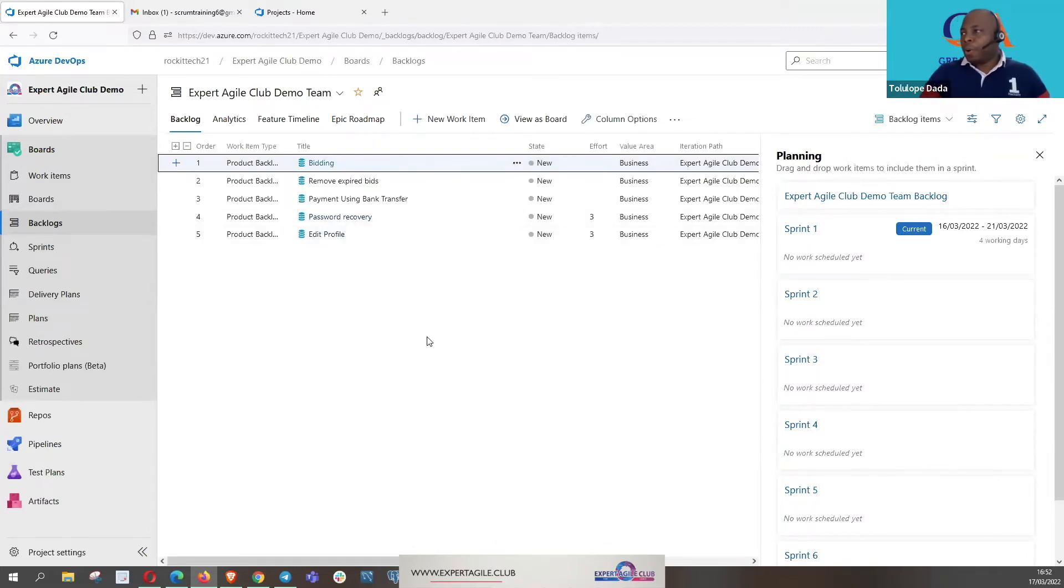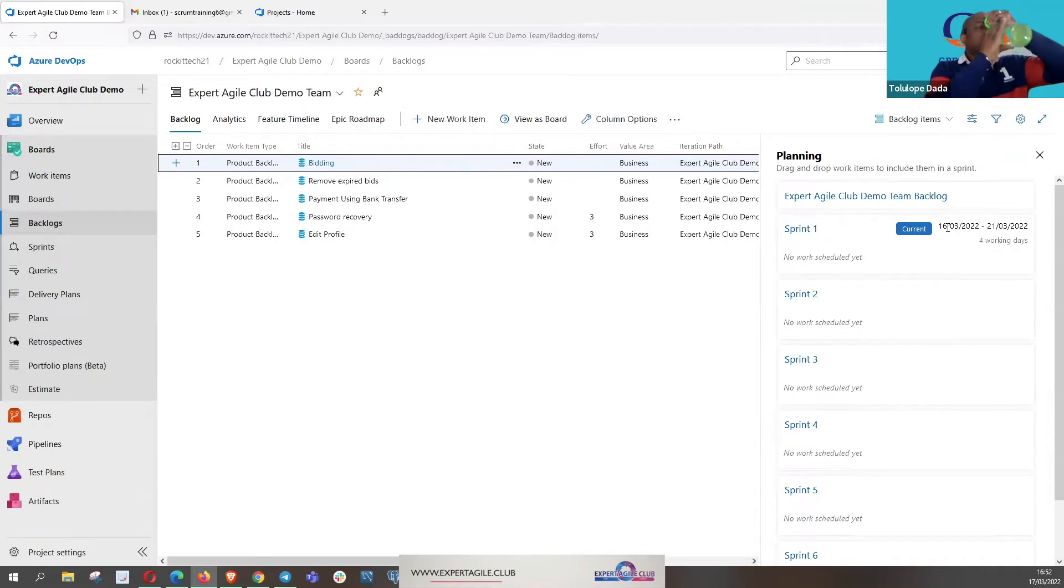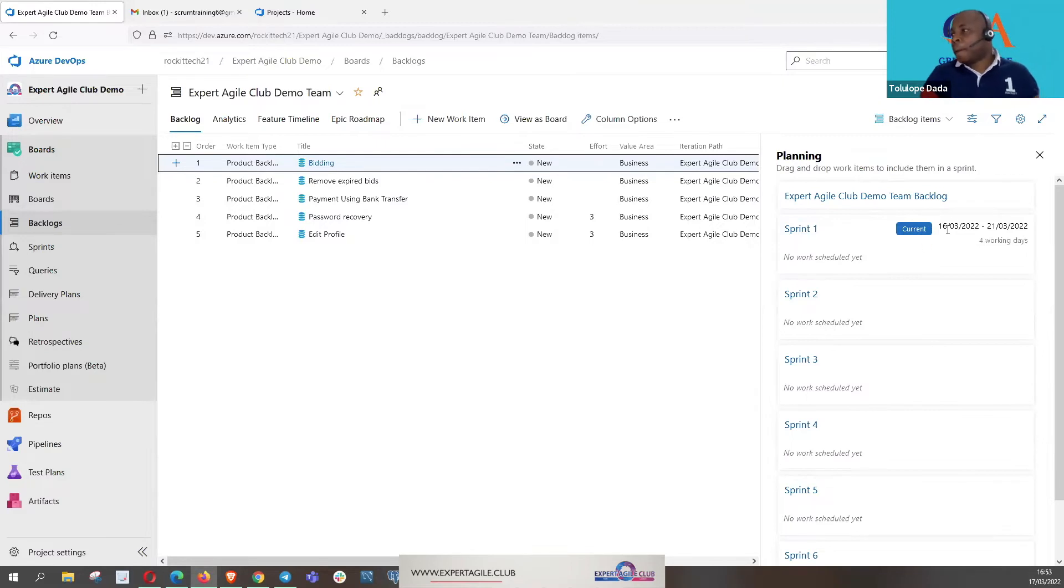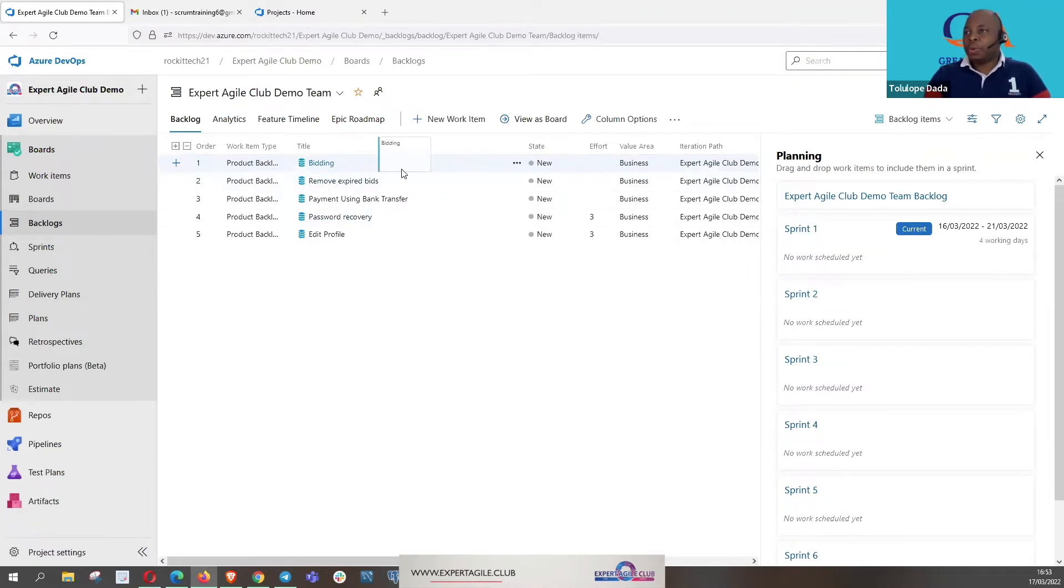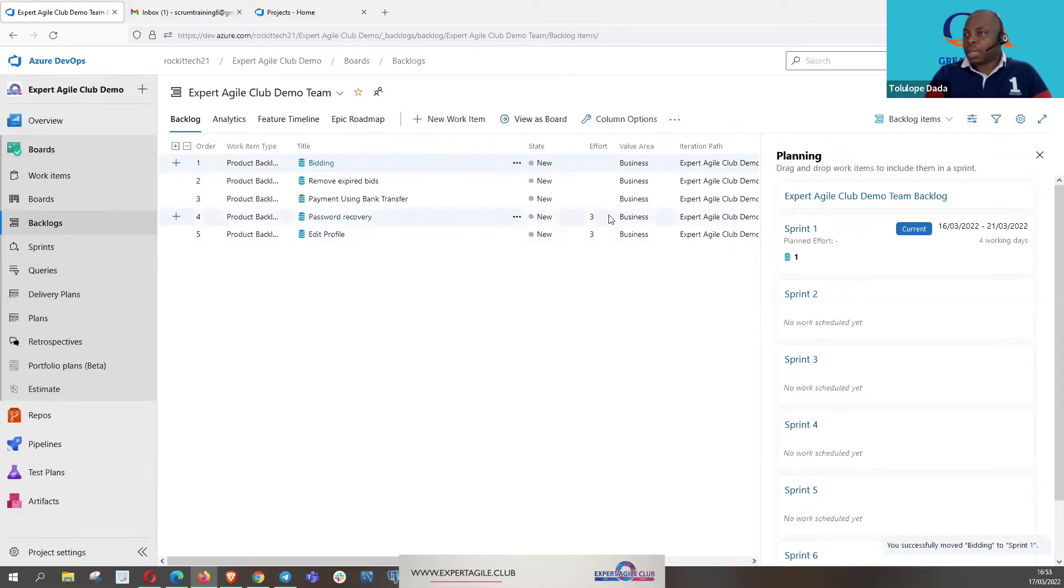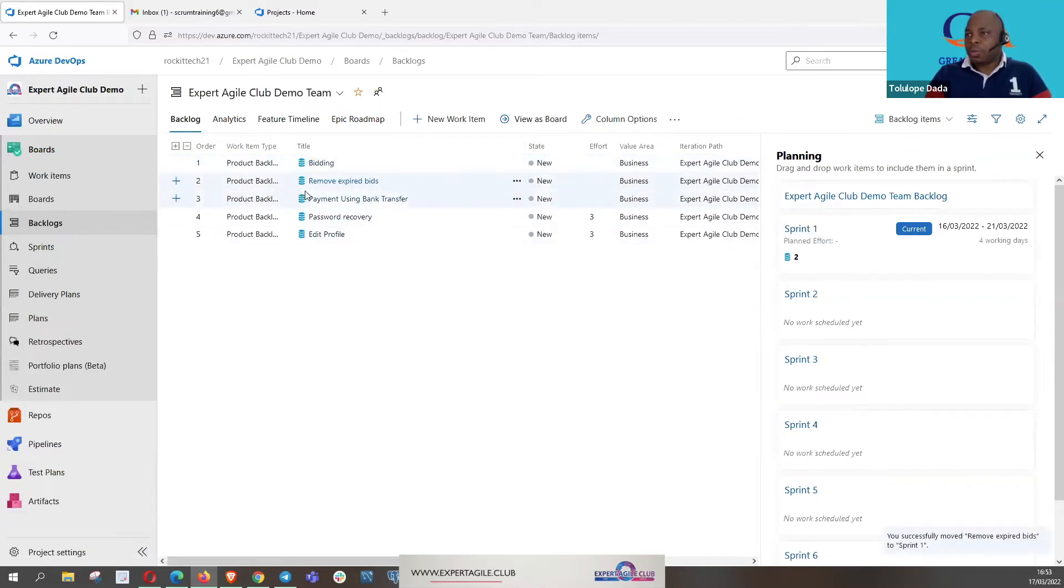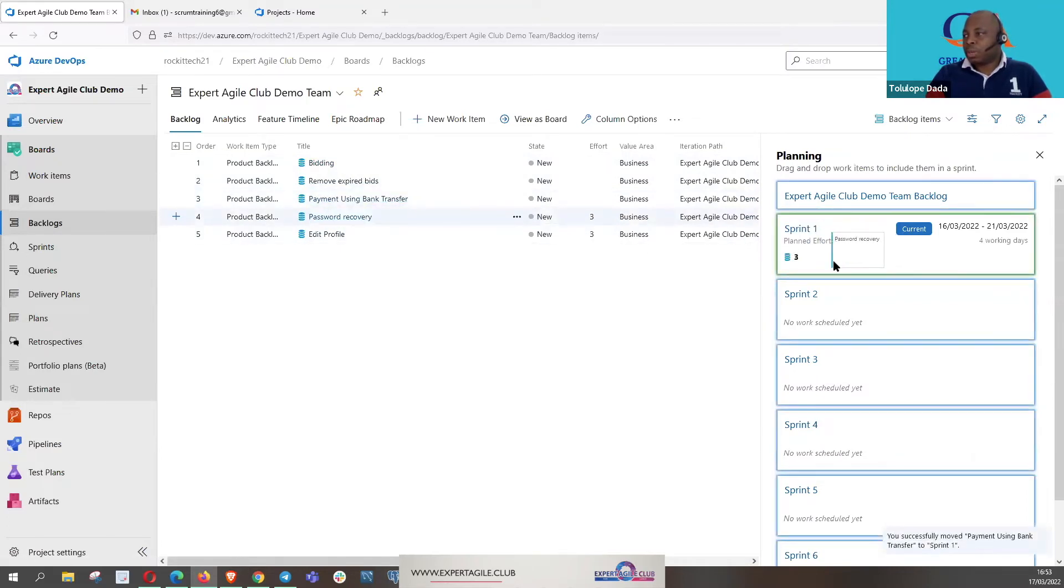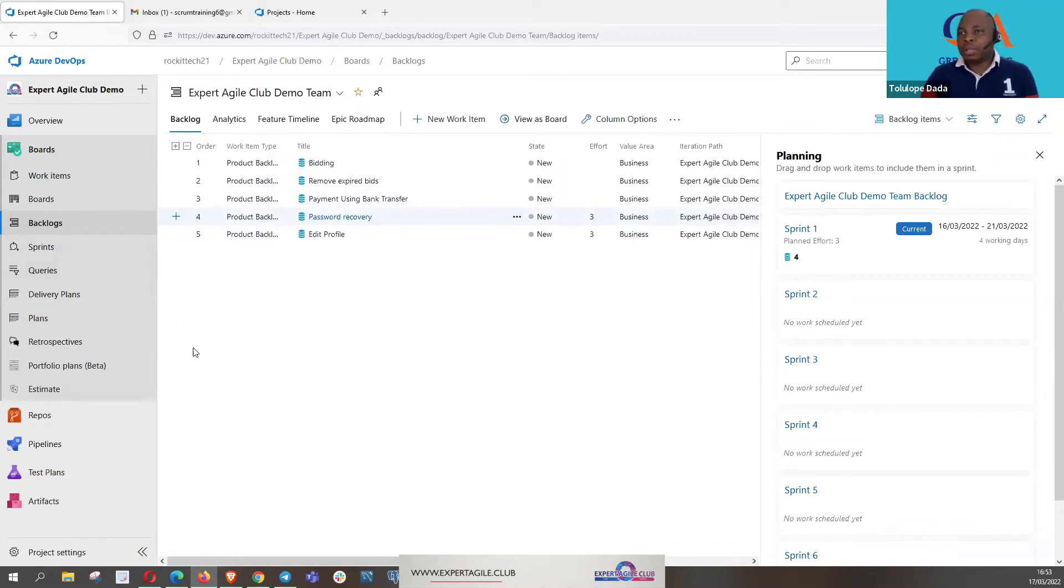You can see the sprint buckets are open there. We have sprint one, sprint two, sprint three. Sprint one has been dated for us which is starting on the 16th and is finishing on the 21st. In Azure DevOps, what we do is we click and drag, so you drag the items that you have refined and they're ready to go for sprint. You drag them into the sprint. Maybe that's one, that's the second one, that's the third one, there's a fourth one.